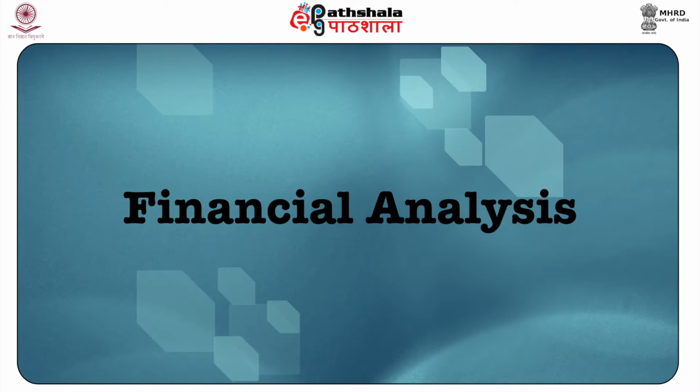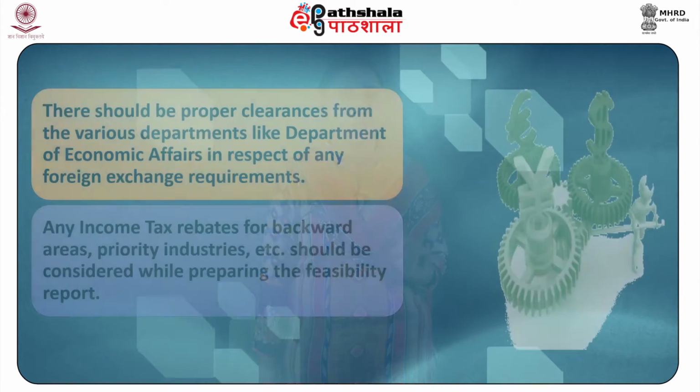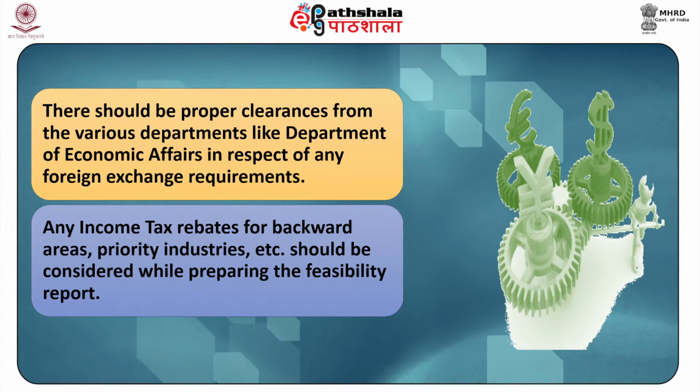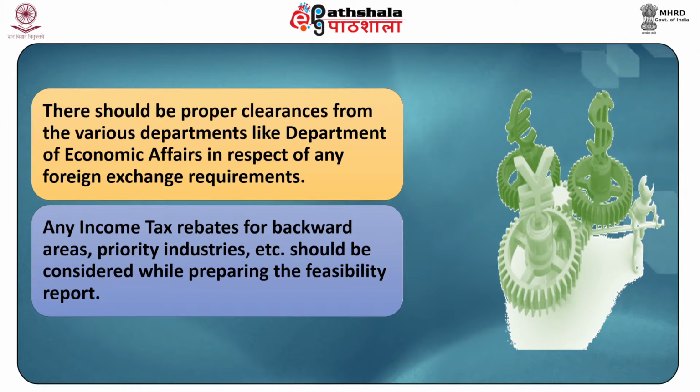Number seven, financial analysis. Any project should also be financially viable. The project data is represented in the form of a memorandum or pro forma balance sheet, which is definitely based upon projected or estimated figures. The Bureau of Public Enterprises has prescribed the rates of depreciation in this relation. They must be adhered to while preparing the pro forma balance sheet. There should be proper clearances from the various departments like the Department of Economic Affairs in respect of any foreign exchange requirements. Any income tax rebates for backward areas, priority industries, etc. should be considered while preparing the feasibility report.